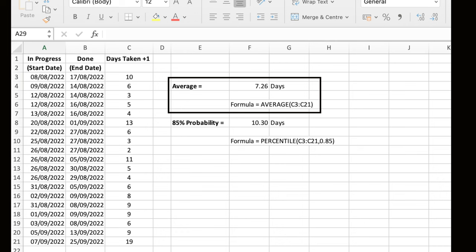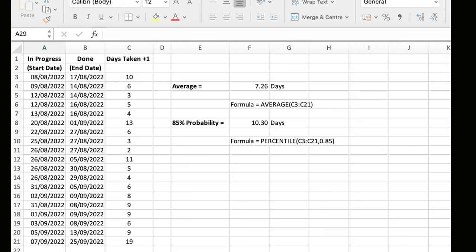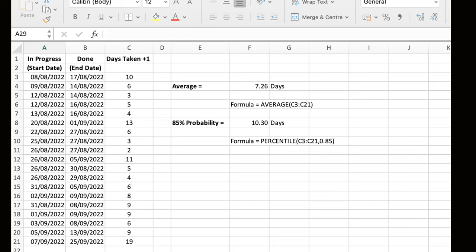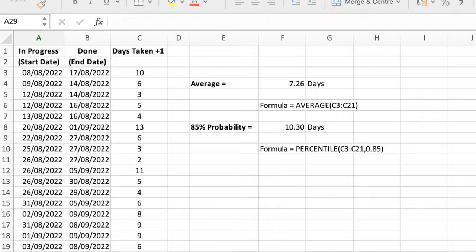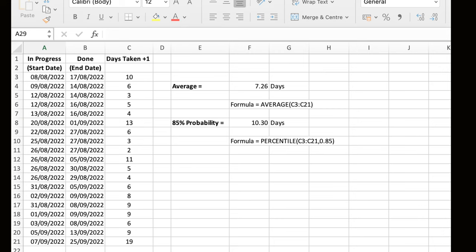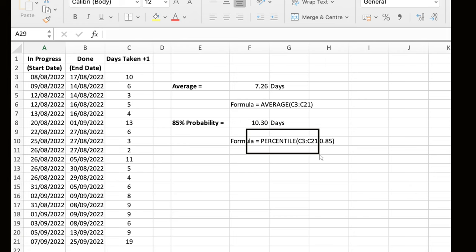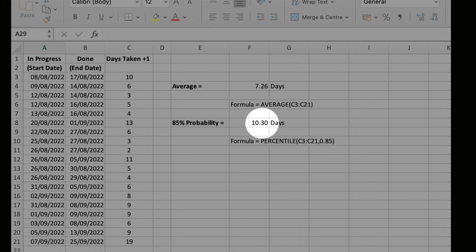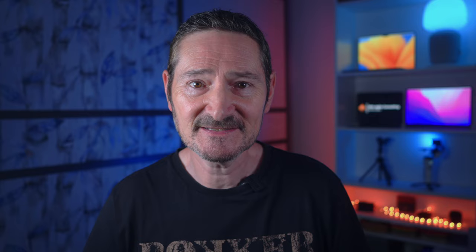We could take an average of all this, but we don't want to use an average — plans based on assumptions about average conditions usually go wrong, distorting accounts, undermining forecasts and dooming apparently well-considered projects. Instead, we want a high probability that our work item will finish, so let's use 85%, the 85th percentile. You can choose which probability you want and discuss it with your leadership — it's often called an SLE, a service level expectation. We use Excel's percentile function across all individual cycle times. In this example, the 85th percentile for an individual item is 10 days, meaning we have an 85% probability of completing any work item in our sample set in 10 days.